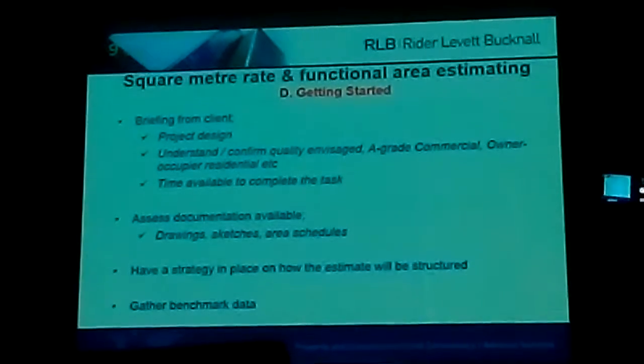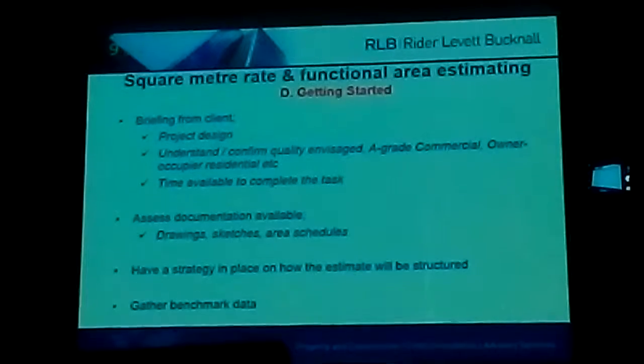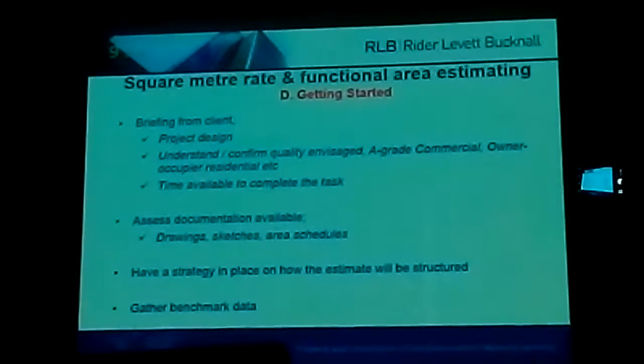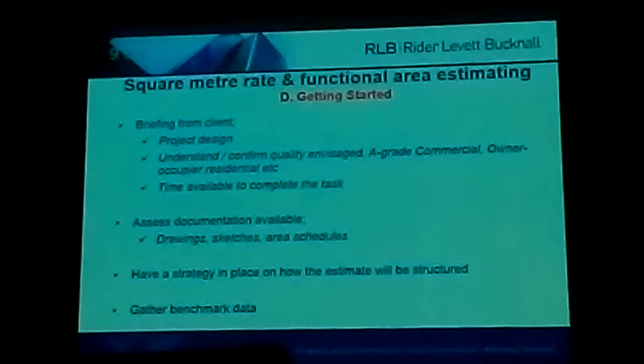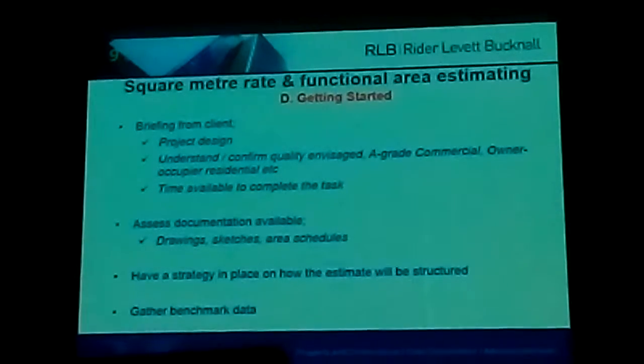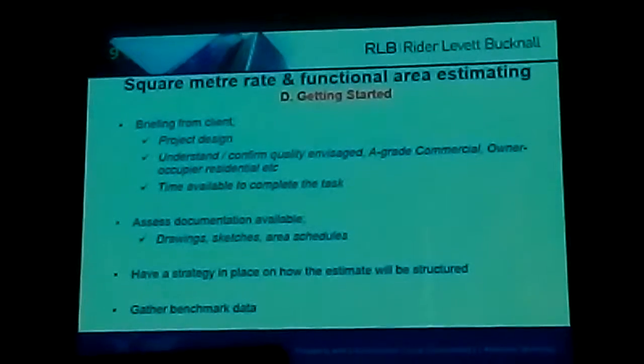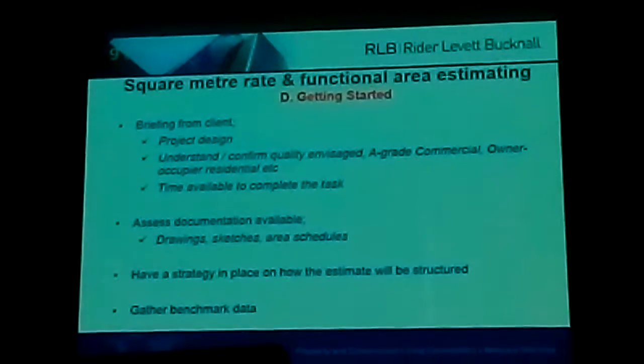Now time to get the estimate started. The first step is to get a detailed briefing from the client. This will help you gain an appreciation of the project design, understand or confirm the quality envisaged for the project, and also give you a time available to complete the task. This will also dictate the level or detail of measurement that can be carried out.